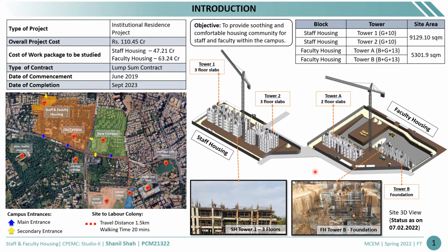Also we have prepared the 3D model on 7th February 2022. At that time the staff housing tower 1 was at the third floor and the faculty housing tower B at the foundation level.